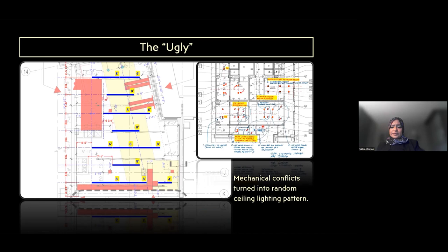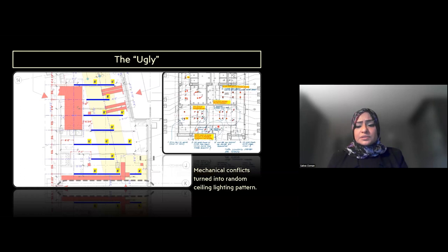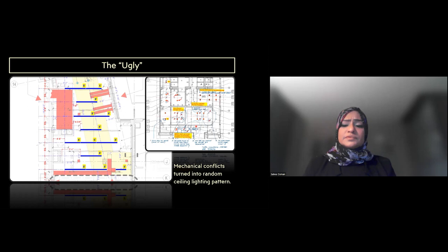In addition to the budget concerns and the schedule, the construction site difficulties added a real level of complexity to the project. The region experienced the second wettest season in 122 years. The schedule was severely impacted by flooding and snow. At the same time, opening day could not be delayed because there was a highly publicized celebrity golf championship slated to take place at the resort. So opening day stayed where it was, even though the project was shut down for months because of flooding and snow.